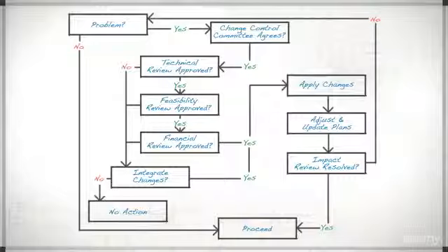Additionally, all project management plans and subsidiary plans will require updates as well as review of the impact of the project's critical path. While change at times may be necessary, it is important for the project manager and team to realize why the change is required and what the change means relative to the overall project deliverable. The question should be raised: can the project be completed successfully without implementing the change?